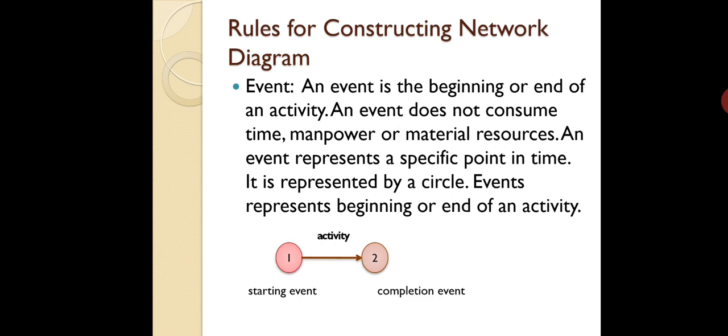Then what is an event? An event is the beginning or end of an activity, and it does not consume time, manpower or material resources. They are just a specific point in time and represented by a circle. Events represent the beginning or end of an activity. The circle placed at the tail side of an activity represents the starting event, whereas the circle placed at the completion side represents the completing event.